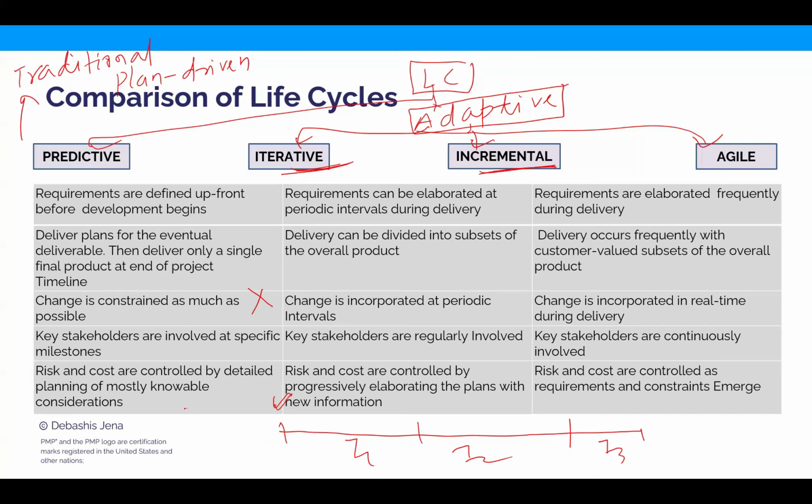Even here, you put up a plan and prepare a project plan at the beginning of the project. But watch, in the plan, iteration 1 is planned to a detailed level. Iteration 1 is detailed, but iterations 2 and 3 are only a high level plan. You do not perform detailed planning for iterations 2 and 3 upfront. So the idea is what? We'll complete iteration 1.